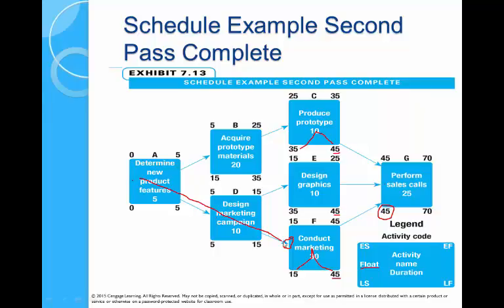So a critical path is the path in the network that has no float. You can see here the difference between 35 and 25. There is 10 days float here and 10 days float here. It doesn't mean there's 20 days float, because if we delayed this by 10, that becomes 35. Then if we delayed this by 10, that's 35, 45, 55, and then we're delayed. So that can't be 55, it must finish by 45.